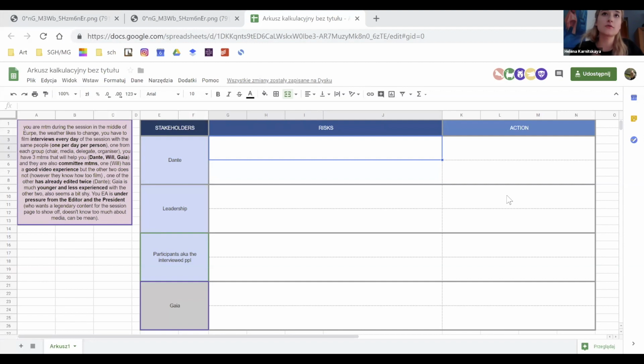And running out of time, for example, is not a risk itself. There may be a risk that the result would be running out of time and passing the deadline. But if you're doing a project, you have certain deadlines, and you have certain standards you want to meet, and you don't think at the very beginning that you may not meet some of them. This is not a risk itself. From the very start, you want to meet all your goals and all the deadlines. If you think at the very beginning that you may not meet that, you reconsider if your timeline is correct.